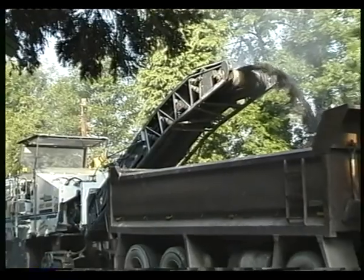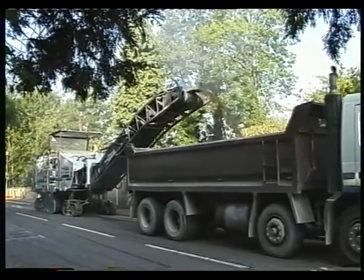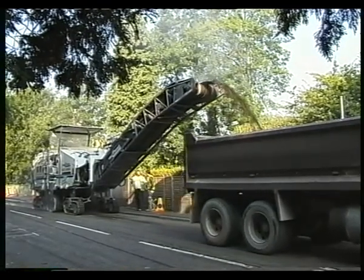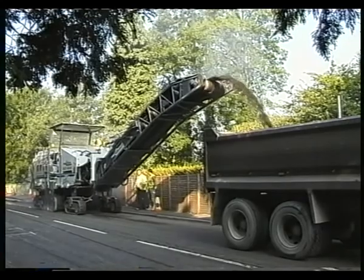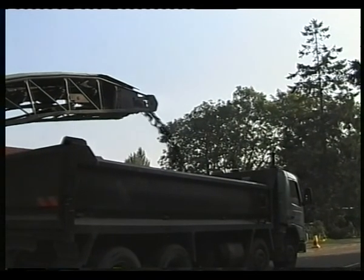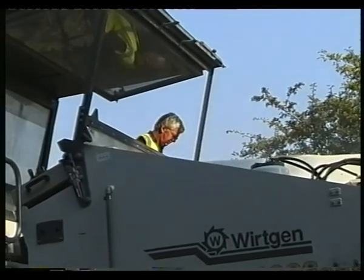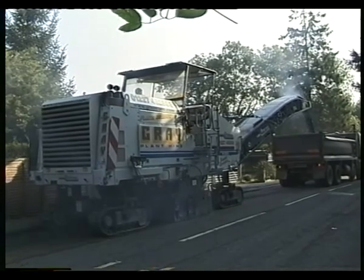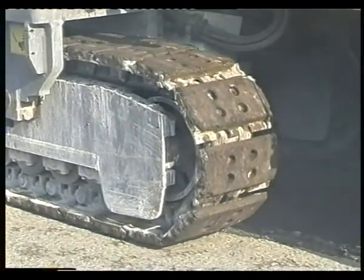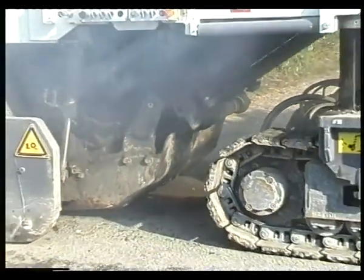Like a military operation, work began early on Saturday morning. The planers stripped 30mm of surface from the road, and a convoy of lorries took away the planings. Residents had been warned that the entire high street would be closed for 2 days. It was essential that work was completed by Sunday evening, to allow businesses to run as near to normal the following day.